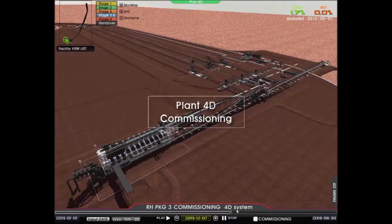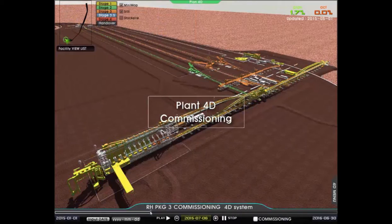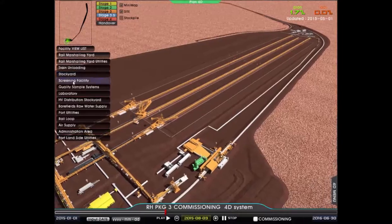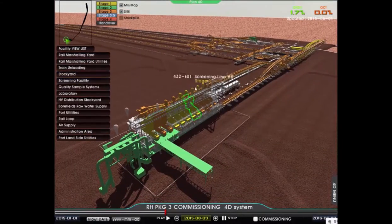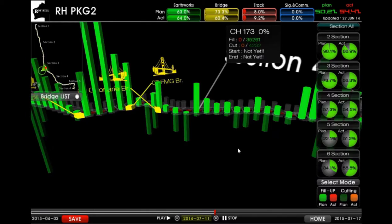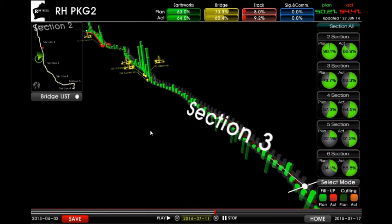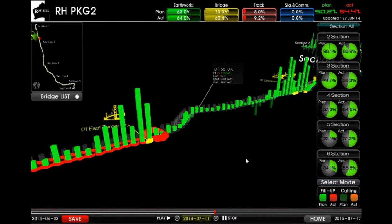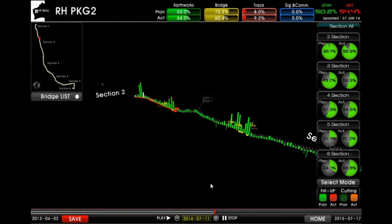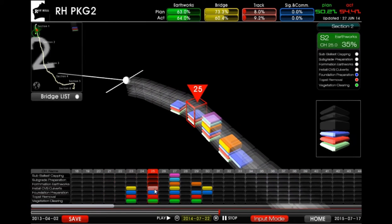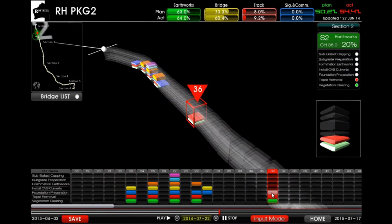Easy 4D has been applied in various projects. This project is the Roy Hill Iron Ore Plant project in Australia. Especially, the 320 km railroad was divided into 1 km unit PM-type 3D models to manage earth volumes such as cutting and banking. Progress status of each segment can be managed by each operation type to minimize progress interference.